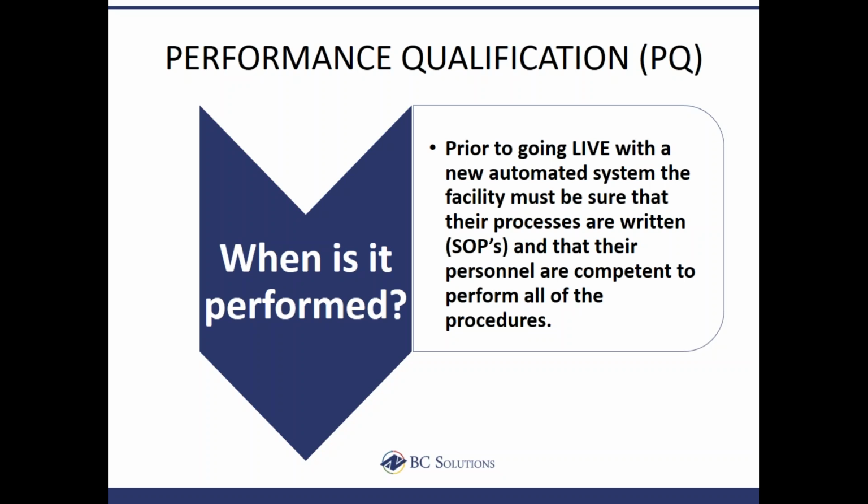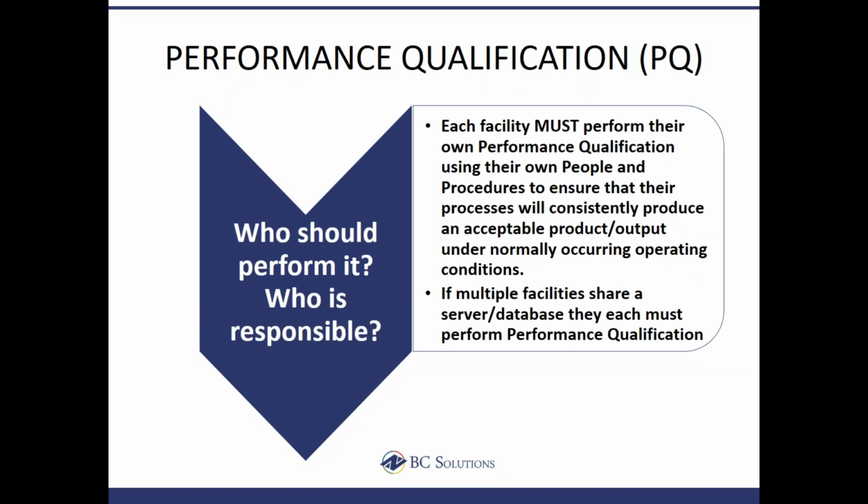Now we're going to do it differently because we found out that didn't work in OQ and we had too many anomalies. I guarantee you the people who are trained are now going to be confused about which process they are supposed to use. So we always tell people to try and do this after their OQ is done, but that doesn't always work out. So just keep in mind that there might be a retraining needed if anything gets changed after we find anomalies in our systems when we do our OQ. So just keep that in mind.